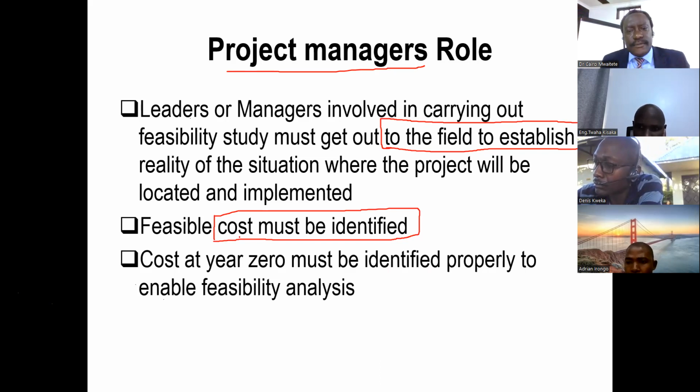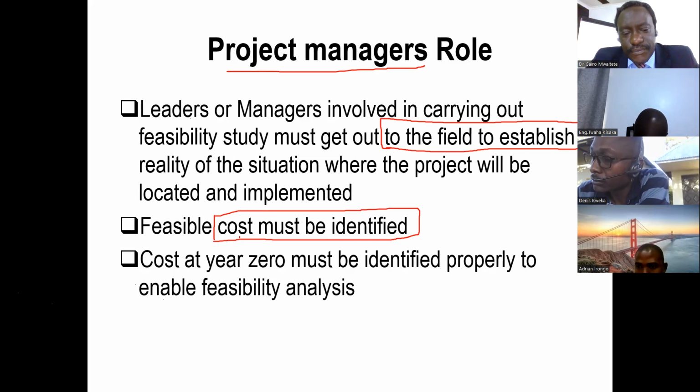But so long as it has some elements of profitability, we must assess. So which criteria do you use? Either use the payback period, but for bigger projects, you cannot use the payback period, my friend. You'll have to use net present value or internal rate of return, and others that are very commonly used by people. But again, we will discuss much when we talk about project appraisal issues. So for managers, is that okay? Thank you, doctor. I'm okay. Thank you.